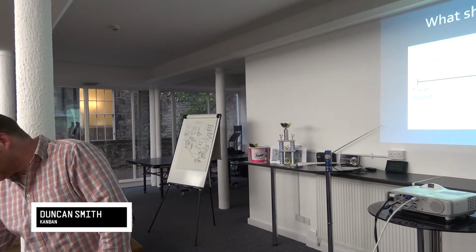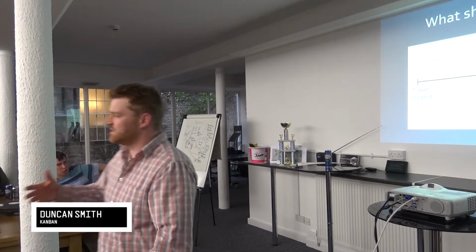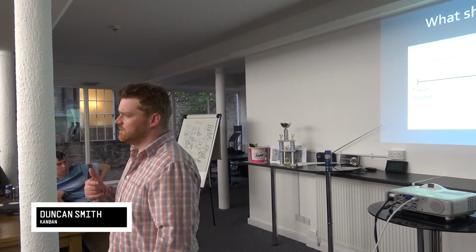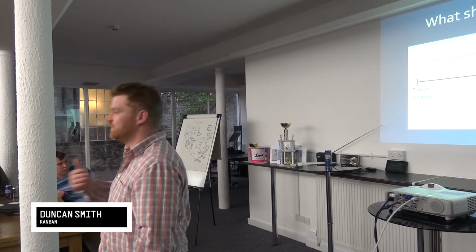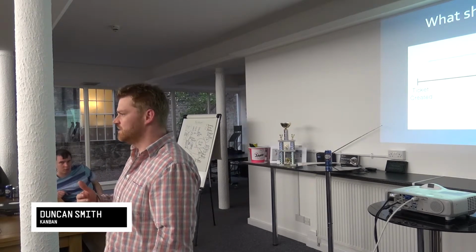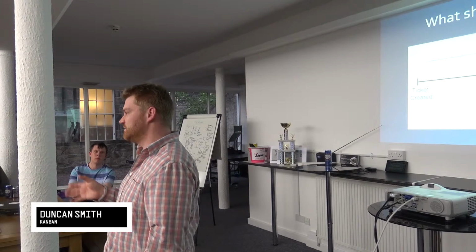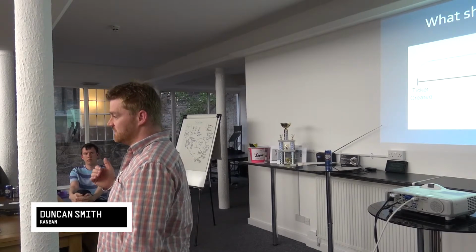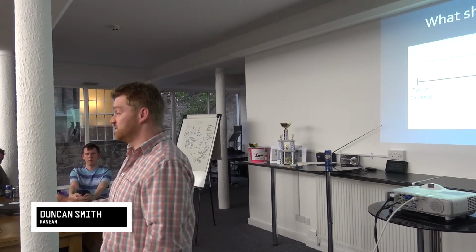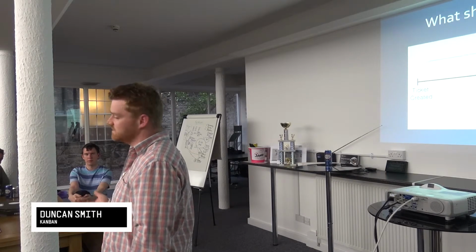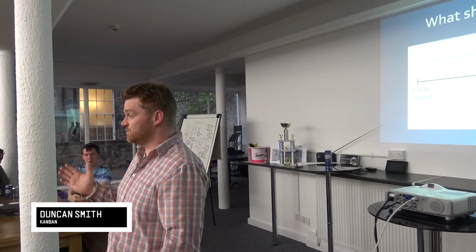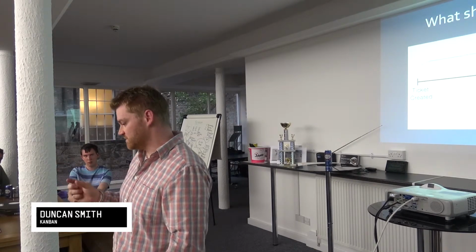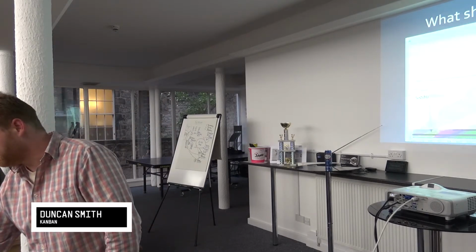Predictability, getting team efficiency, I've talked about that. There is another one called takt time, which tends to be seen a lot less, and it's really about the rhythm at which you need to deliver, sometimes akin to supply and demand. So there's no point in delivering stuff way faster than you need to supply it, you're just going too fast. So if there's something you can do in there to adjust the speed that you've got through, that's something you would look for with takt time.